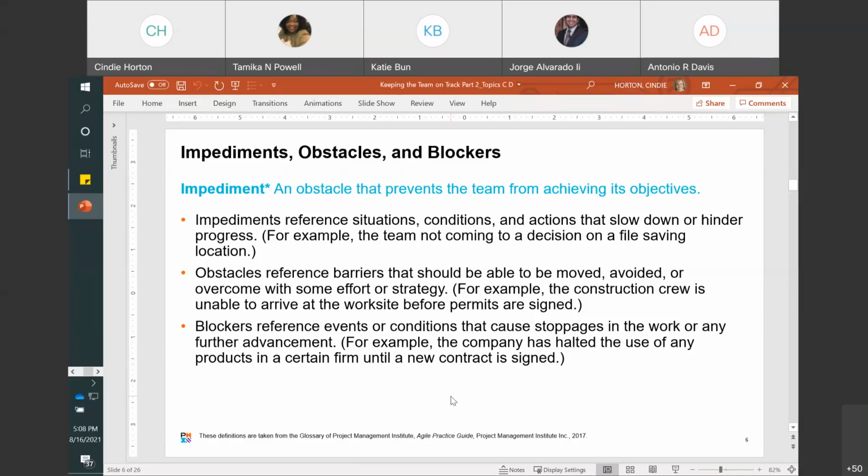The number and weight of impediments may vary throughout the project. The variation may even fluctuate throughout the day. The team identifies the impediments and they bring them to the attention of others on the team. And the project manager assists in facilitating the evaluation of the impediments and how they could or could not impact the team's ability to deliver value. Based on those judgments, the team figures out how to address the impediments. Often, the resolution or occasionally the research is performed by the project manager to enable the team to focus on more meaningful, productive tasks.